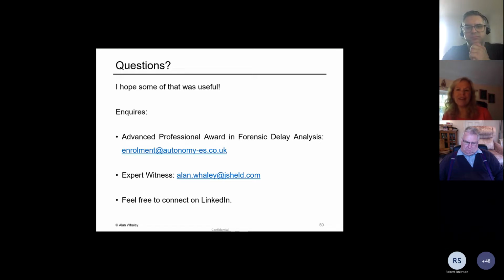How does delay analysis differ between NEC and JCT contracts? That's a very good question. I think that the NEC contract is much more prescriptive than JCT, and NEC obviously requires the project manager to assess a delay, arguably prospectively. So what the project manager should do is deal with the EOT event as close as possible to the date, the dividing date, effectively, the notification date, or the instruction date.